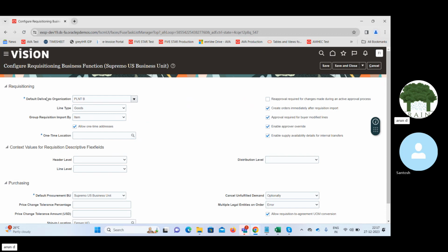So we are discussing internally, saying that I need so and so item on so and so date at this particular location. Okay, so now this will go through the approval process and all those things are fine, because this is an internal document. But the purchase order is an external document, so that is the reason they will want to have control at the purchase order. One such requirement that I got is that I want to create the requisition from any business operation office, but the purchase order will be created only from the head office.